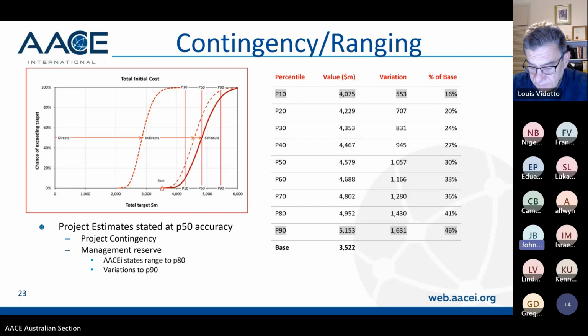And then from a benchmarking point of view, he's on that reference class forecasting side, which John looks at with funny eyes, but I still think it's a good idea to have that version that he's got, especially from the Green Book out of the UK, where there's a lot of great benchmarking data against rail and road projects for P50s and P90s, which is excellent reference information. So I really do think there's some good stuff out there that's been done elsewhere.